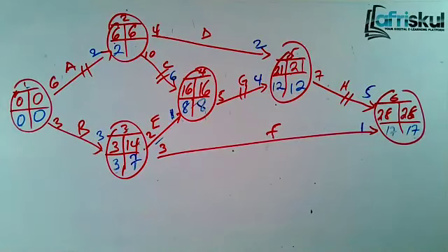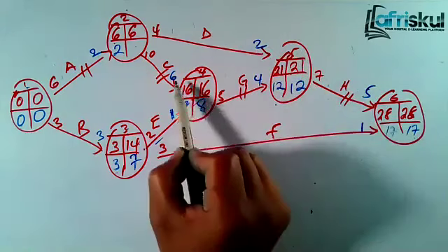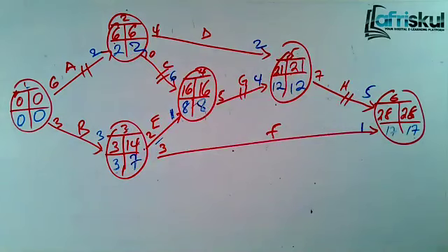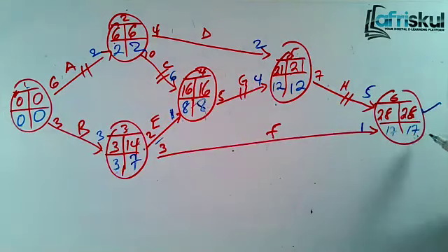That's so impressive. Yeah, the answer is 2 because it's 12 minus 2, you get 10, or 8 minus 6, you get 2. So the minimum is 2. Also, if you crash, the critical path remains the same. So the normal duration was 28, the critical is 17. So you are through with that.